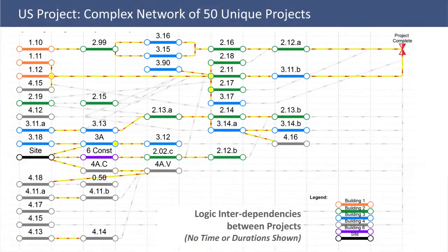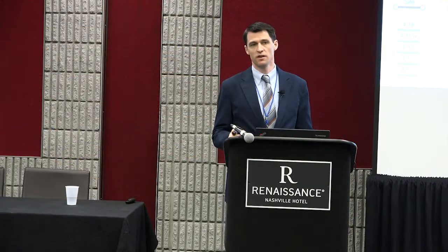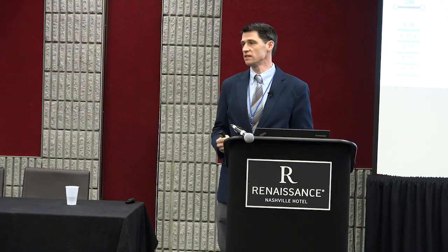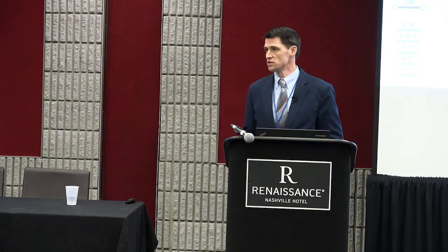And this was a tool that we used Netpoint for that we hadn't really seen done before. This is a logic interdependency graphic that is time and duration independent. The reason we developed this is because there are so many different sub-projects happening within the whole that we needed to figure out the interdependencies between the two.